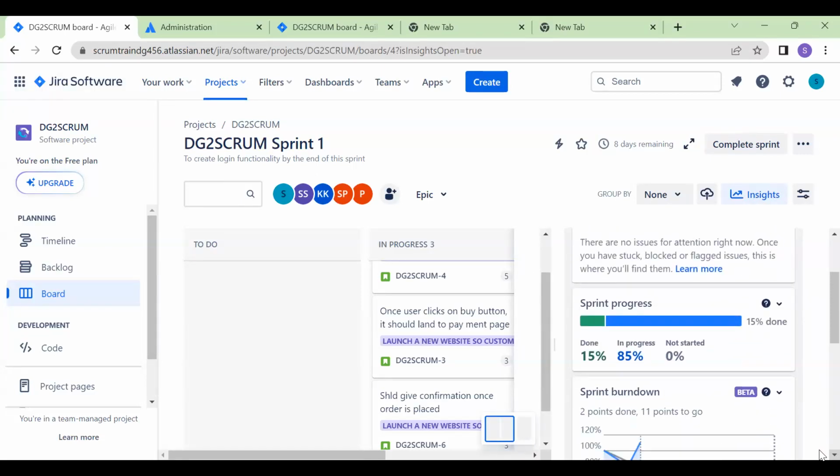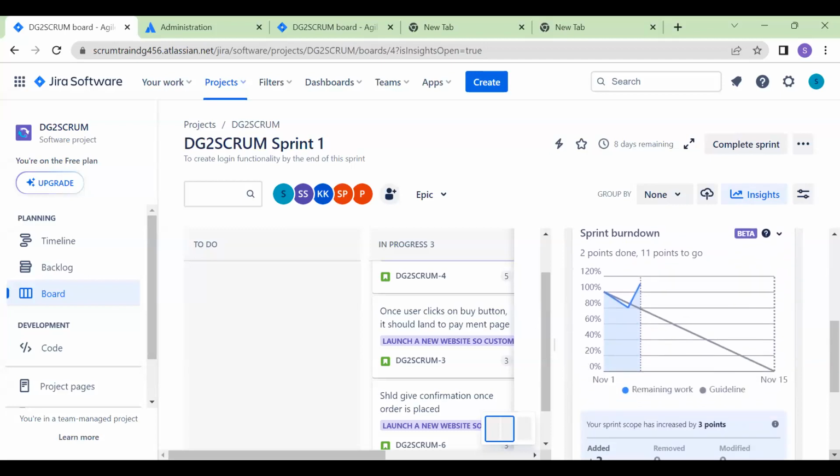So it is taking only things which are working, not which are not. The burndown chart is focusing on the amount of work that has to be completed, not on what has been completed. It is stressing on what is remaining. So in simple terms, the sprint burndown chart says about the remaining work. Please remember that.